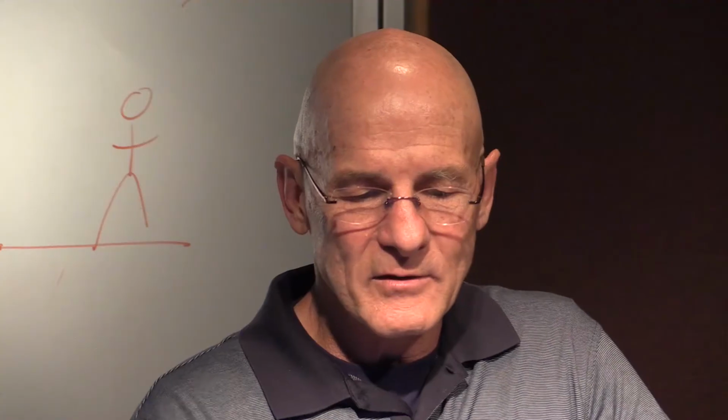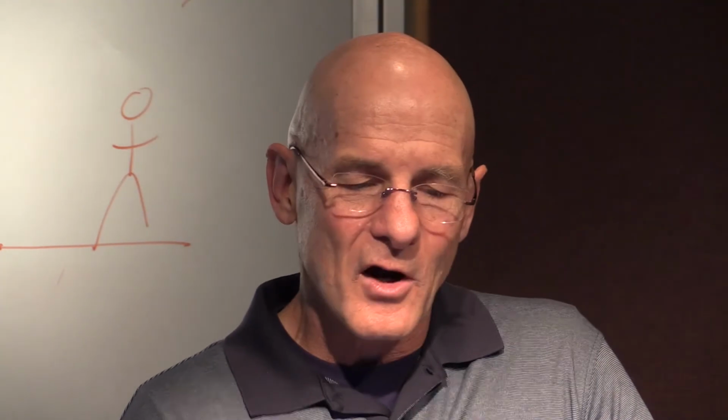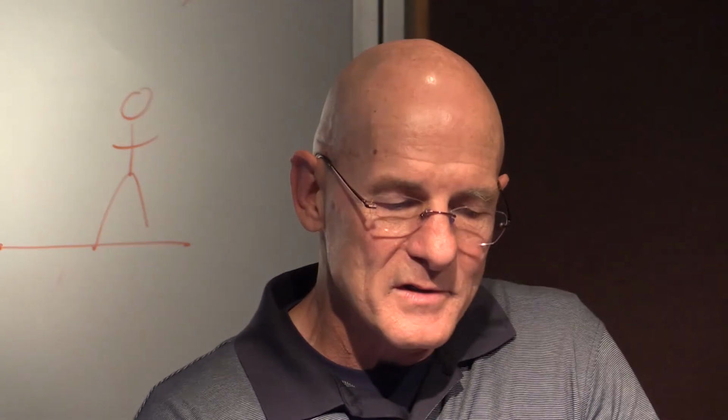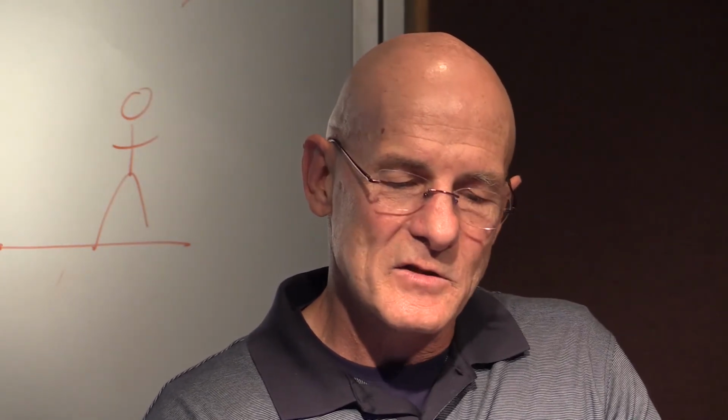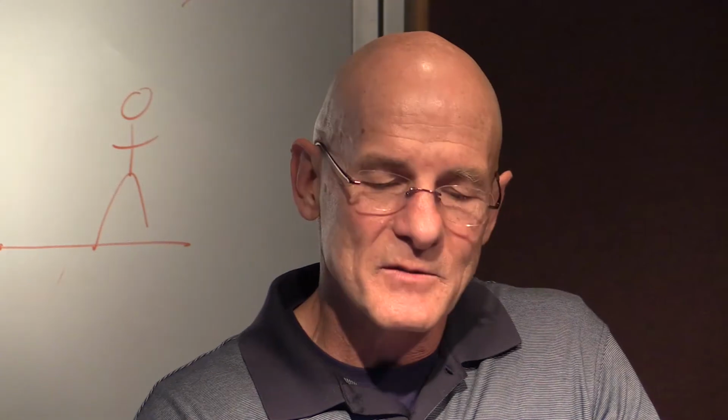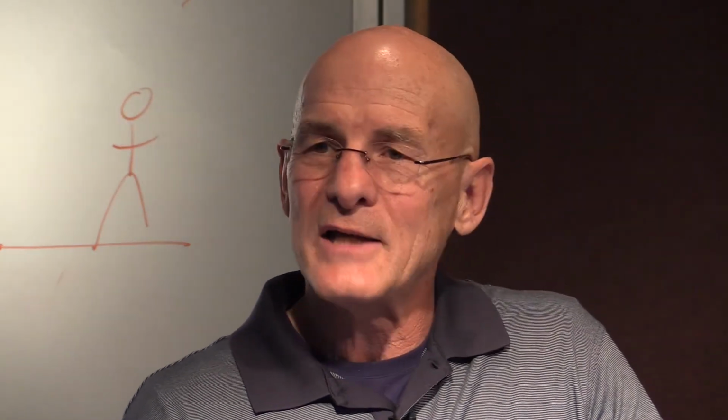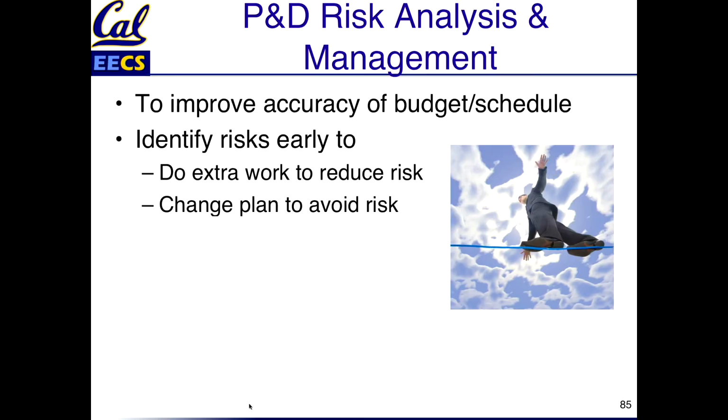Now, to try and increase your chances of hitting the target, there is, borrowed from the business school, risk analysis and management. So basically, you're trying to make this more accurate. So you're trying to guess what the risks are going to be before you do it. And so what do you do if you identify a risk? Well, you can do extra work to reduce the risk, do extra work to prepare yourself, or change your plan so that risk goes away.